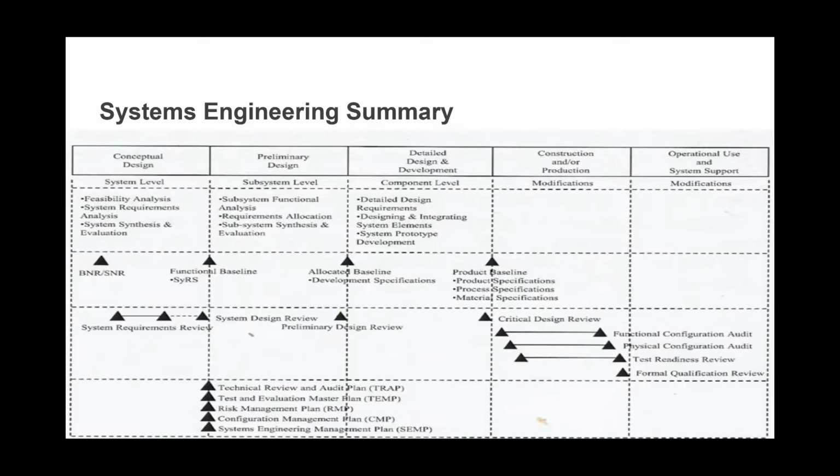When I use the term derived requirements, those derived requirements are basically coming from the functional baseline of a system requirement. A system requirement can be to deliver a rolling stock with XYZ speed, let's say a rolling stock that can operate at 160 kilometers per hour. But then the requirements that will be further drilled down are how the rolling stock will do it.